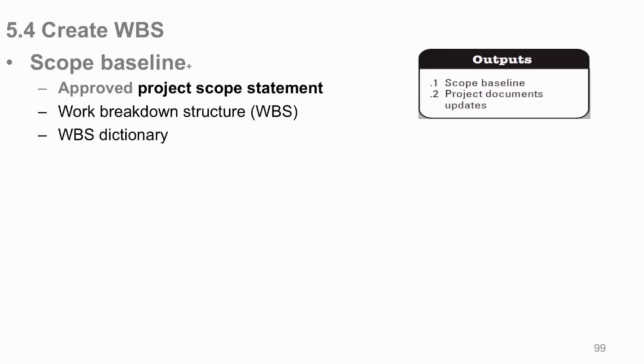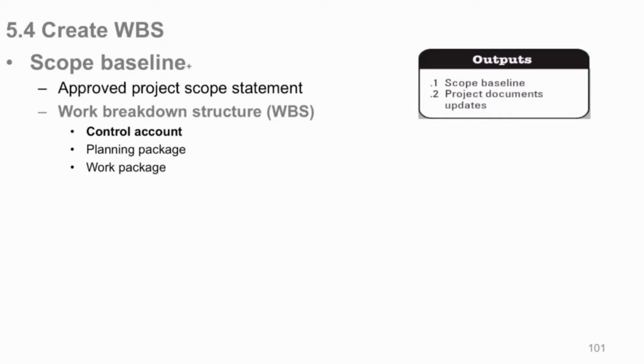A big deal. Work breakdown structure, again, now this has not only work packages, but it has the control account. Now the work packages, if we remember, there are a bunch of them, say in your WBS, where your activities roll up into your work packages that are used for accounting purposes, they aggregate cost and time. All of those work packages eventually will roll up into one or more control accounts that aggregate certain major functionalities into them. You have several of those, and then those will all roll up into a final total cost and duration accounting package way at the top, which is your main deliverable that's built, all put together.